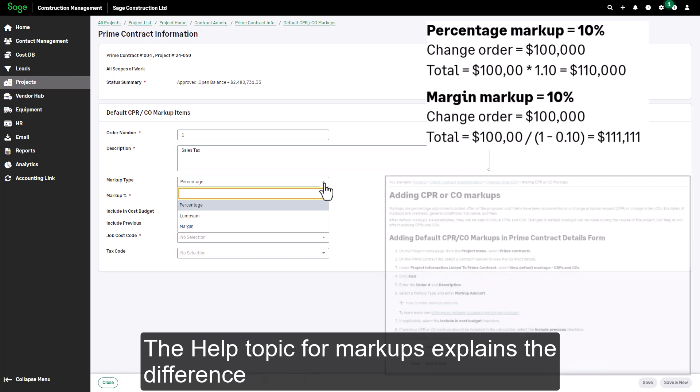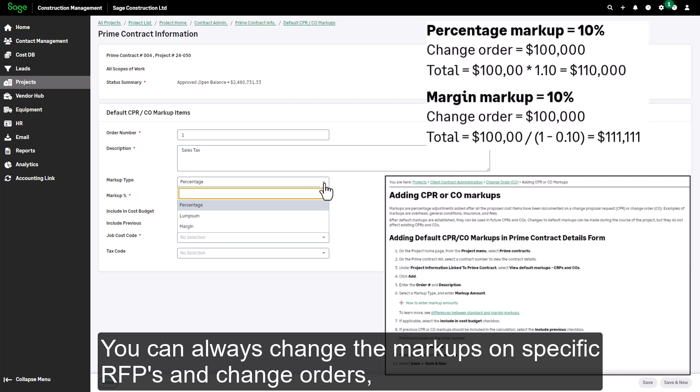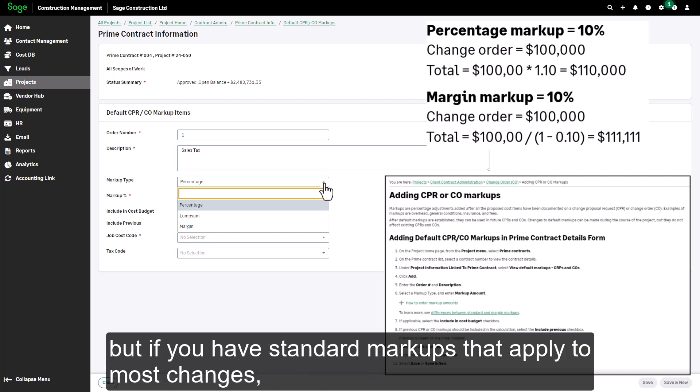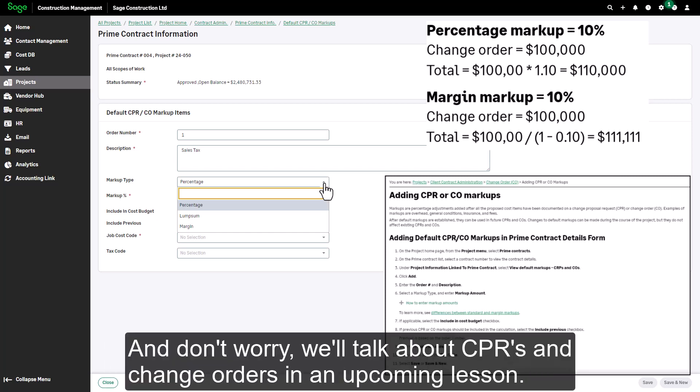The help topic for markups explains the difference in the calculations. You can always change the markups on specific RFPs and change orders, but if you have standard markups that apply to most changes it's useful to set them up here. And don't worry, we'll talk about CPRs and change orders in detail in an upcoming lesson.